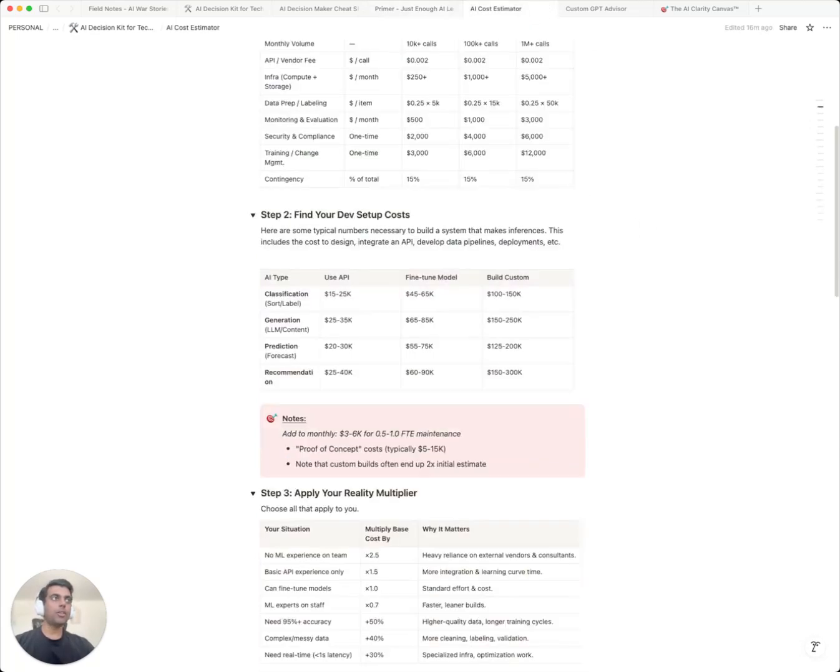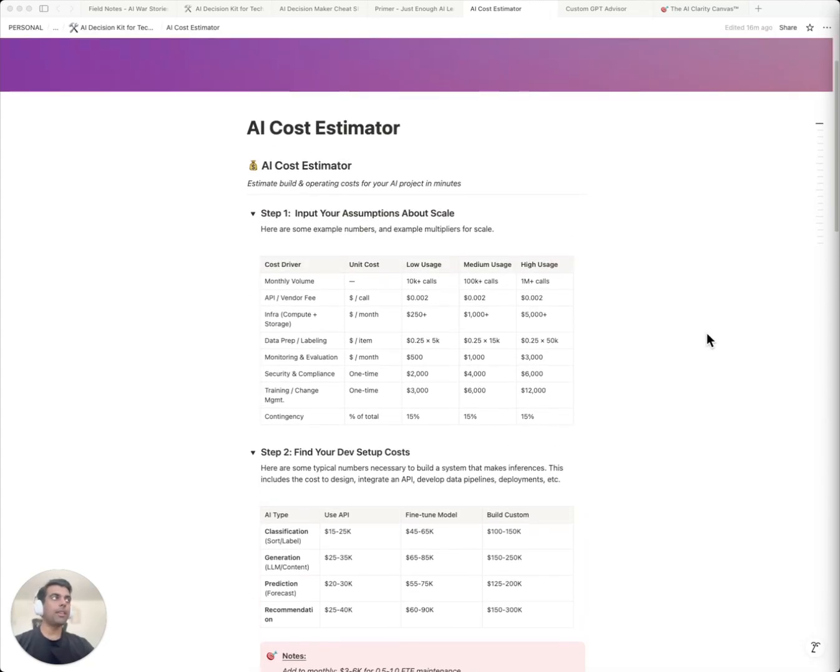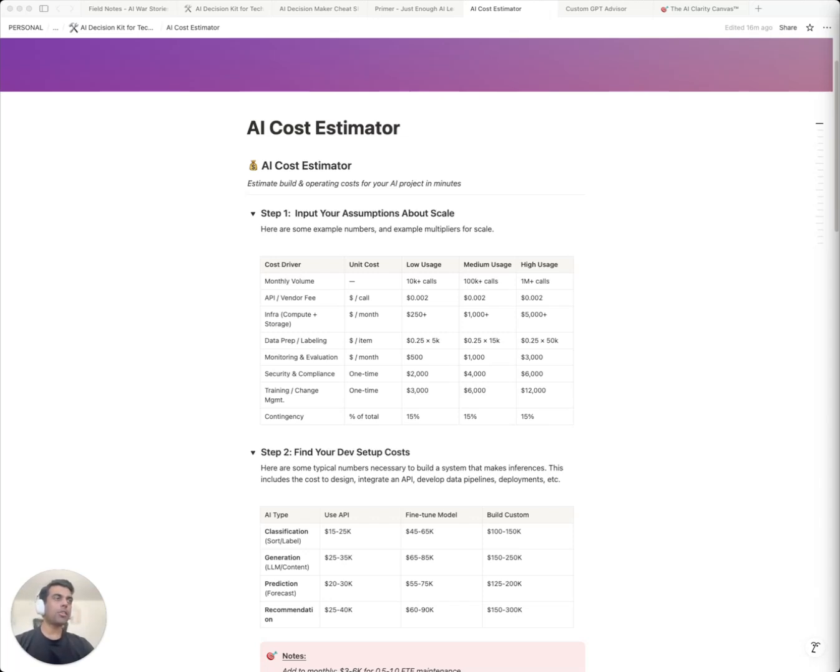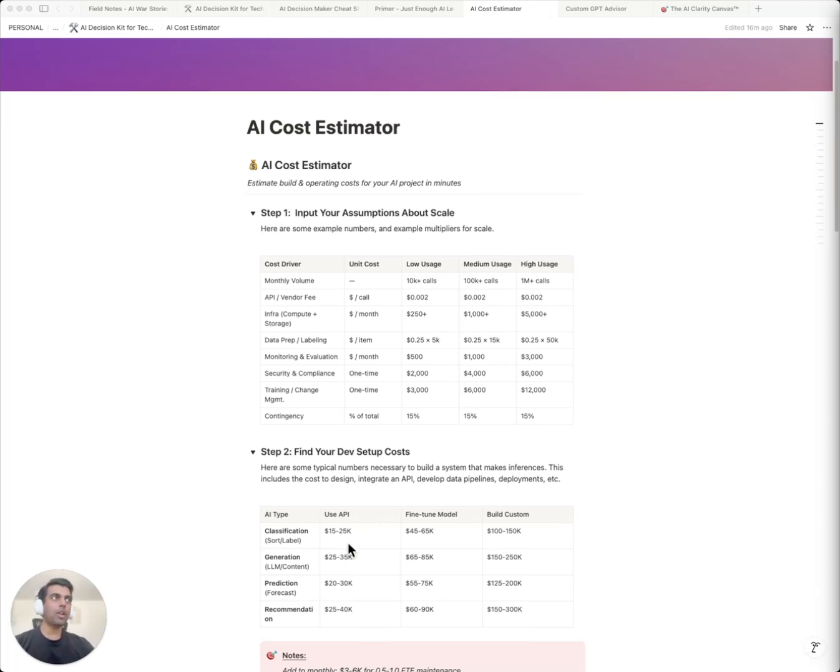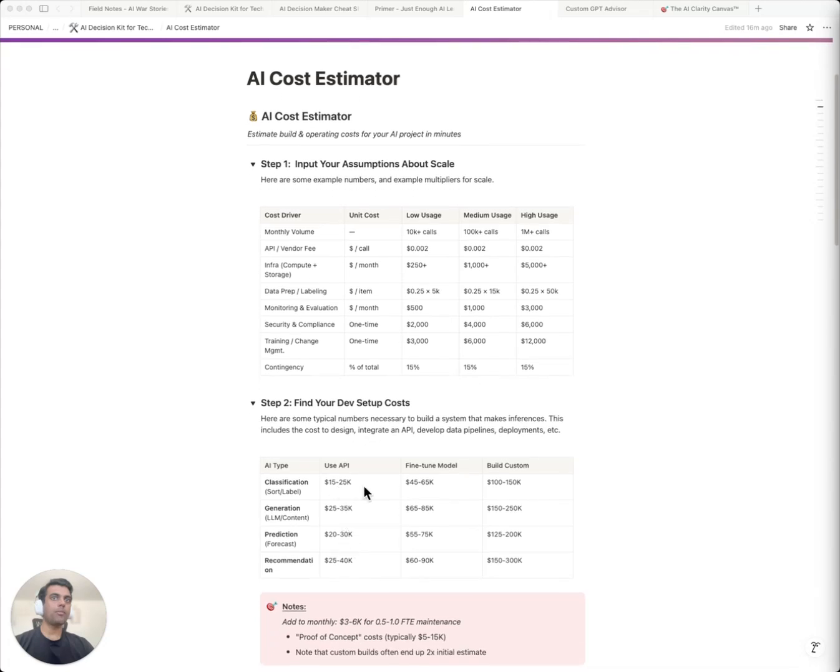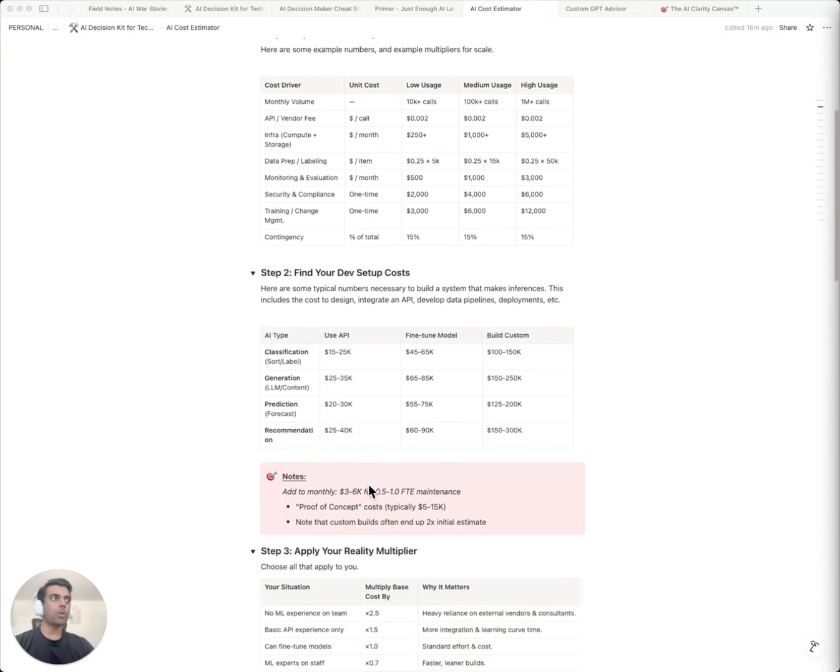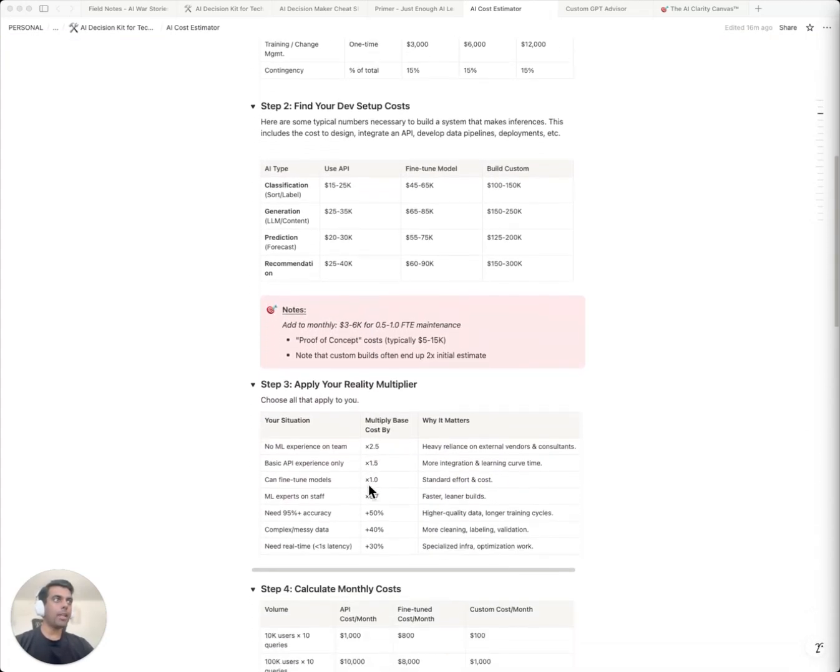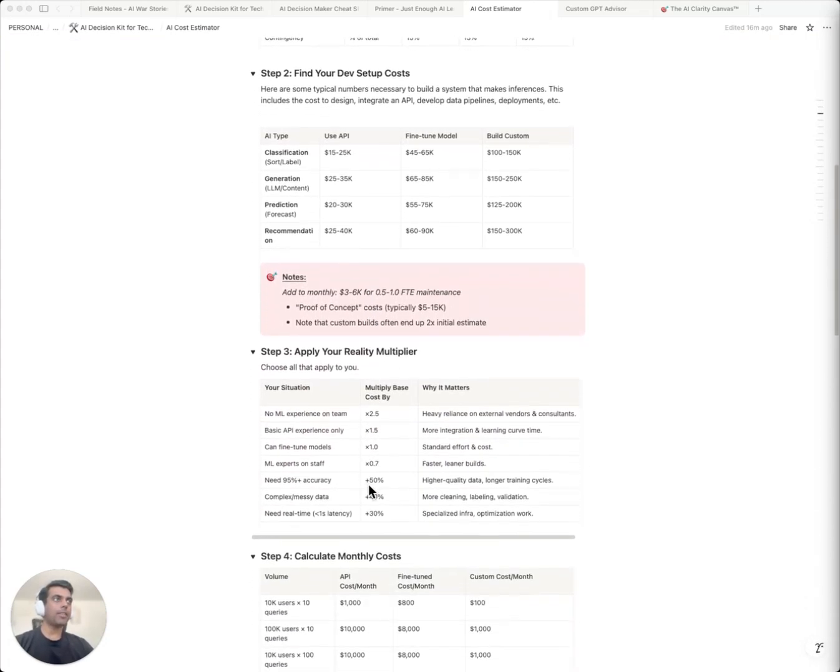There's also the AI cost estimator. Let me show you why most AI projects go over budget. They miss the hidden costs. So let's calculate a real project together. Let's calculate costs for a simple AI project, say content moderation. Say you want to moderate harmful content on your platform. 50,000 users, pretty standard. Vendors will typically cost you about 15 to 25K to build this. Let's go with 20K. Sounds reasonable, right?